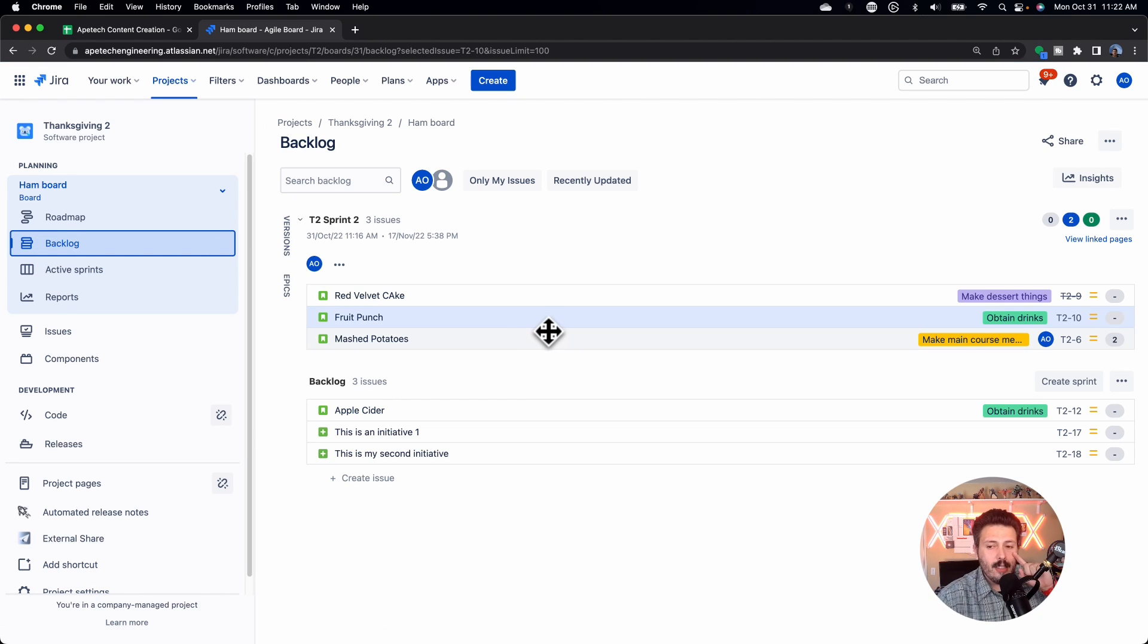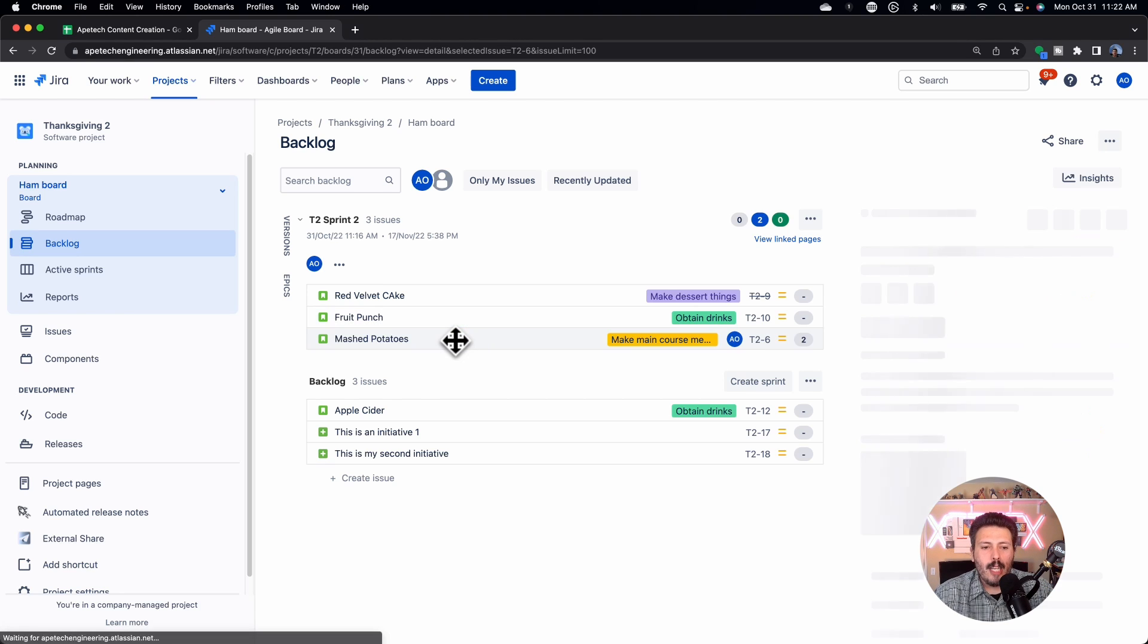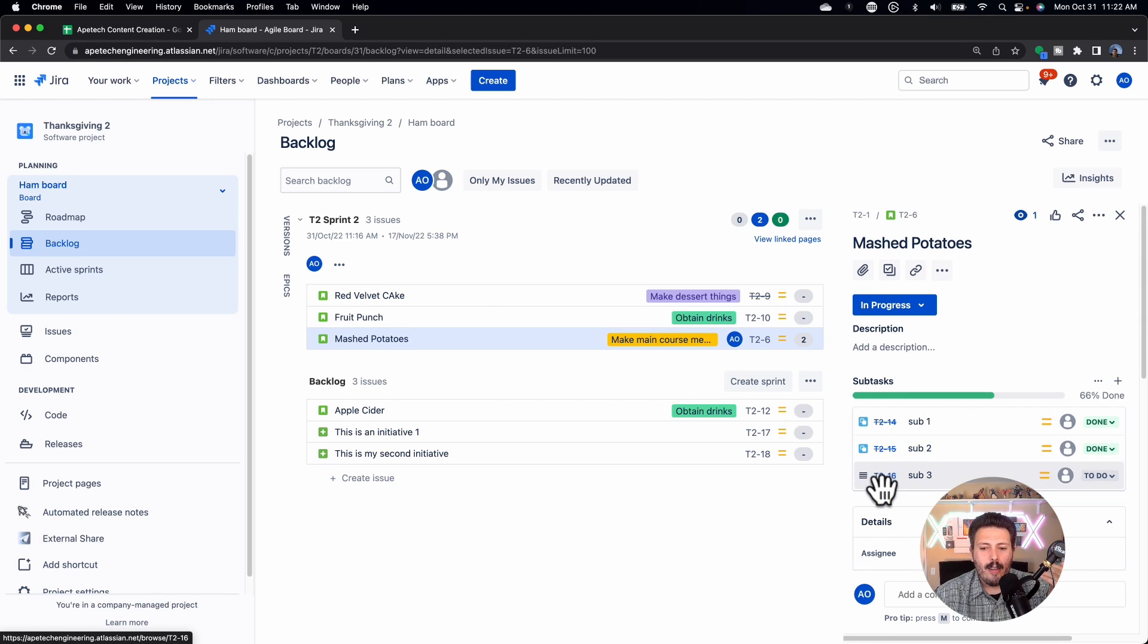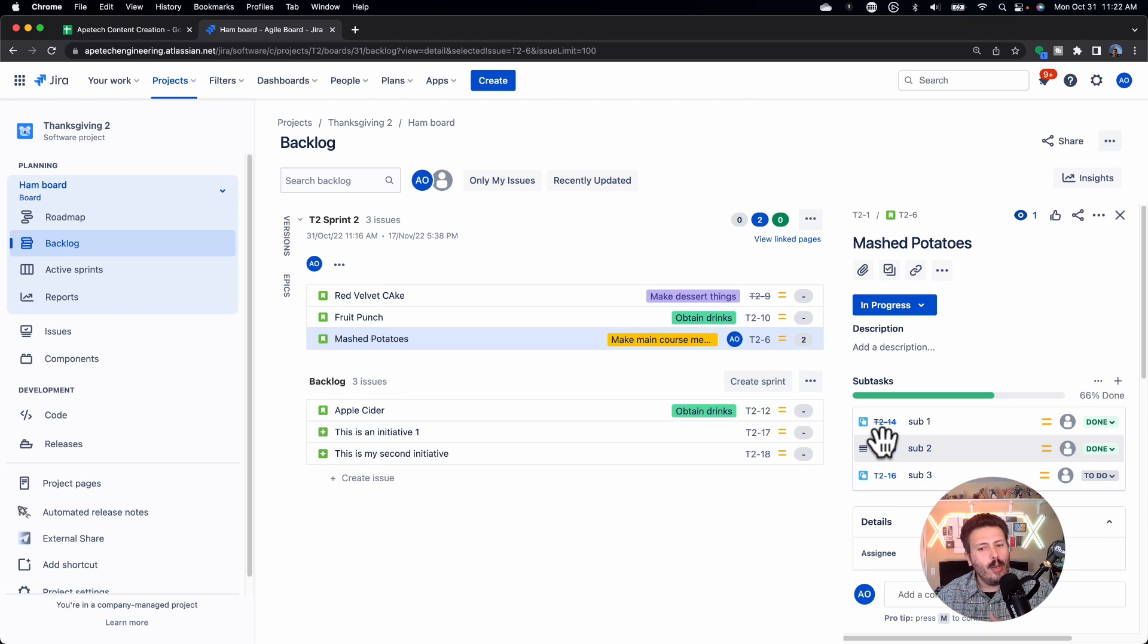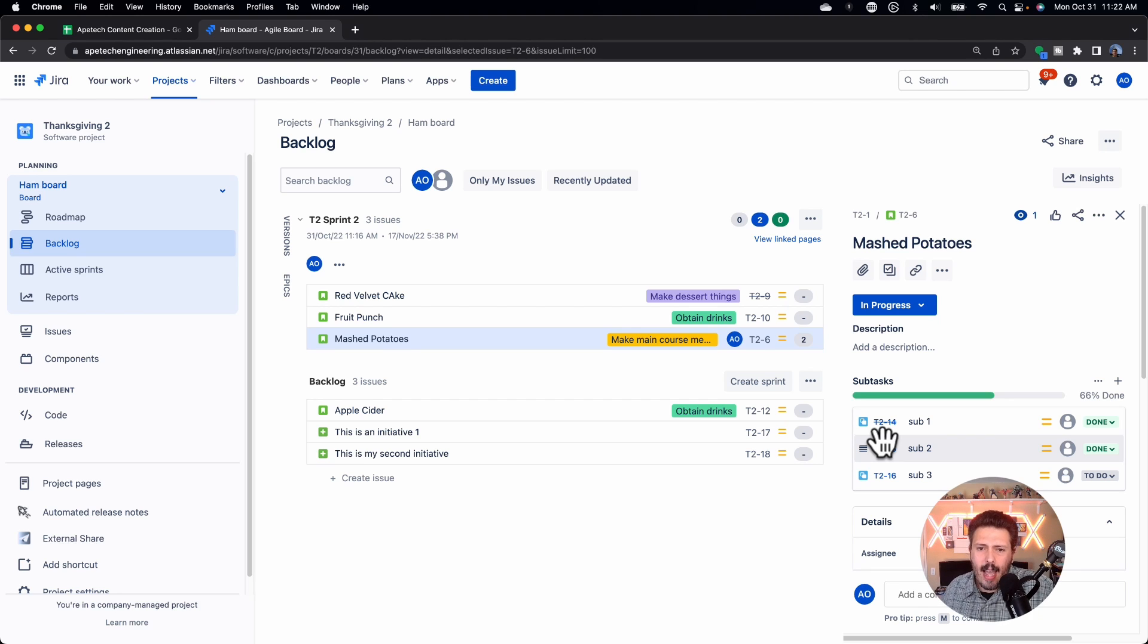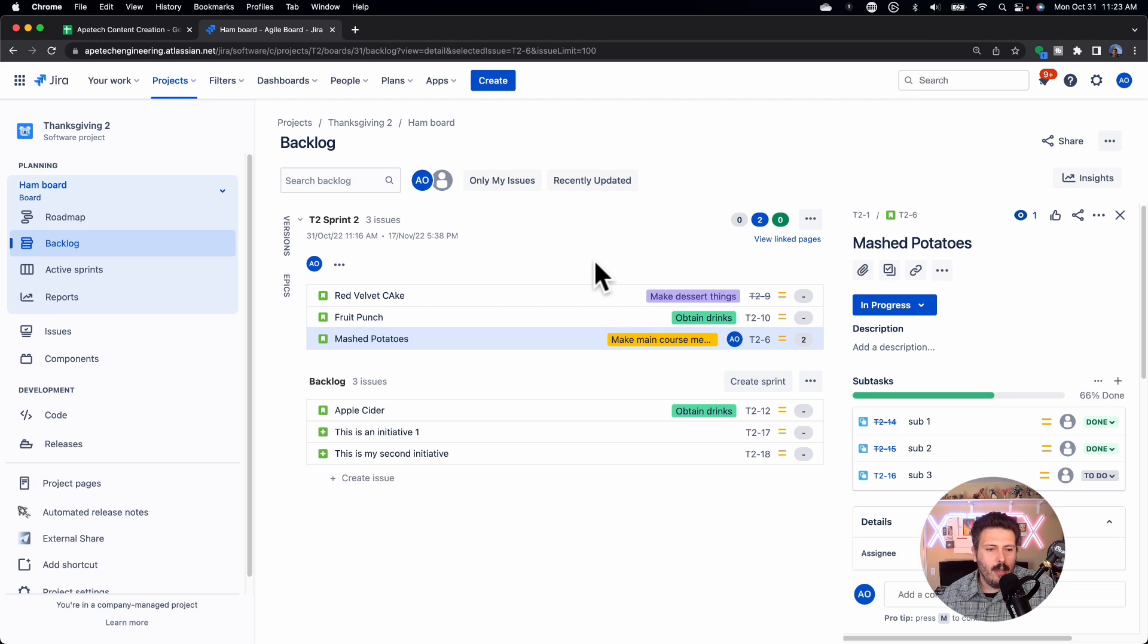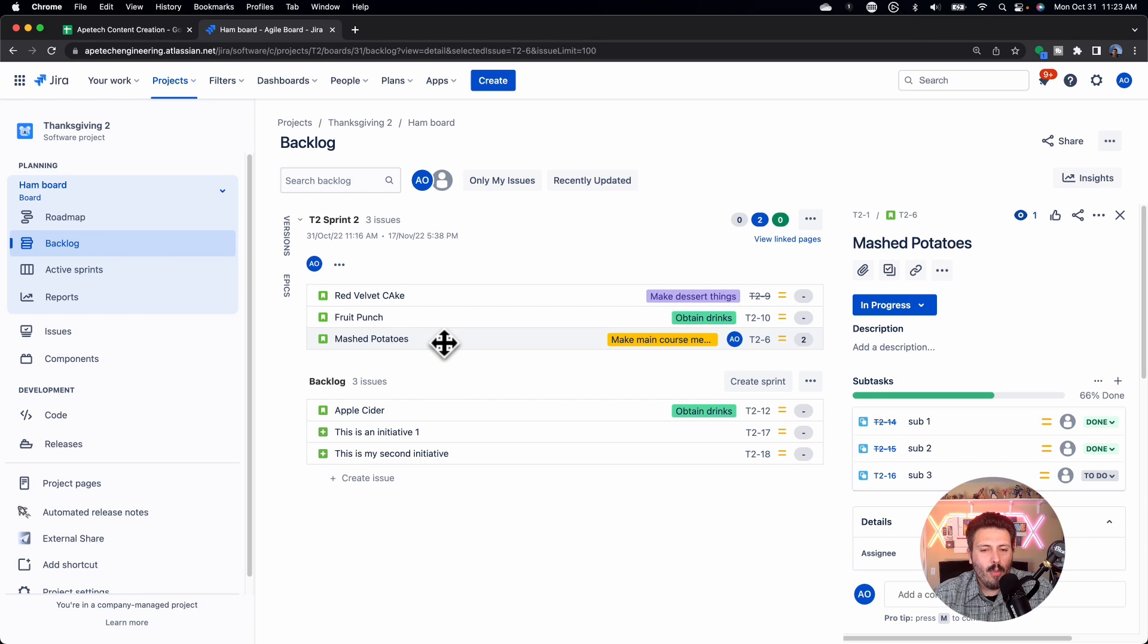But a hidden third option, which is what we're talking about today is, you can actually get out of the active sprint view, go to the backlog, and then find the stories that are not quite done. So for example, we know that there's mashed potatoes, I have two out of three subtasks completed. And so I want to take credit, those two out of three, this is 66%, that's passing, that's not an F, right? And so I want to take credit. I don't want to have to roll the entire story just because I didn't finish 33%. 66% is completely done.